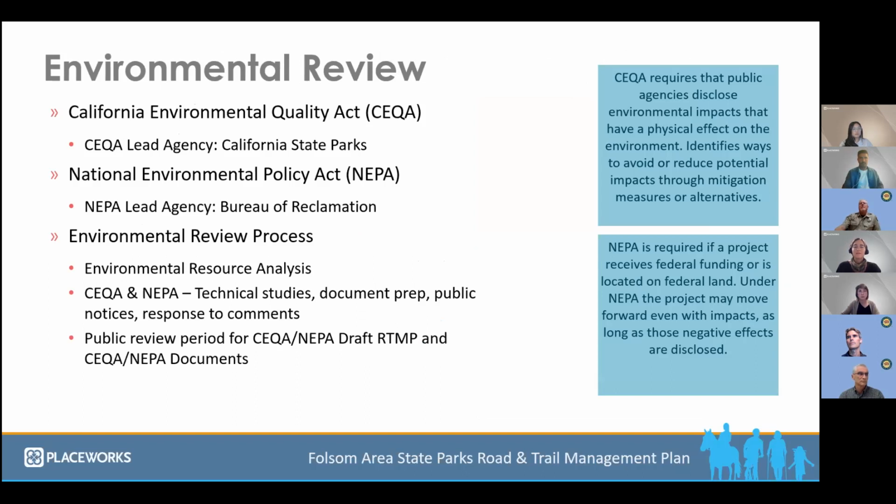As mentioned, we will be doing environmental review. And because the parks include both federal and state lands, we will be doing environmental review in compliance with both the California Environmental Quality Act and the National Environmental Policy Act. The environmental review process will include environmental resource analysis, where we assess the recommendations for any potential impacts. And then we'll be doing technical studies, public notices, and responding to any comments received through that process.